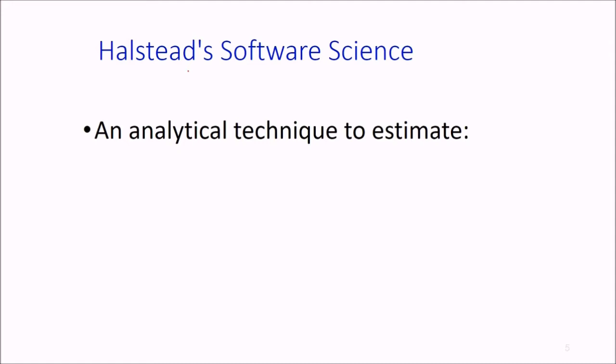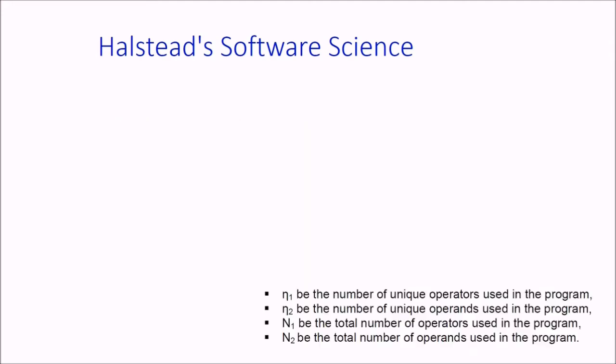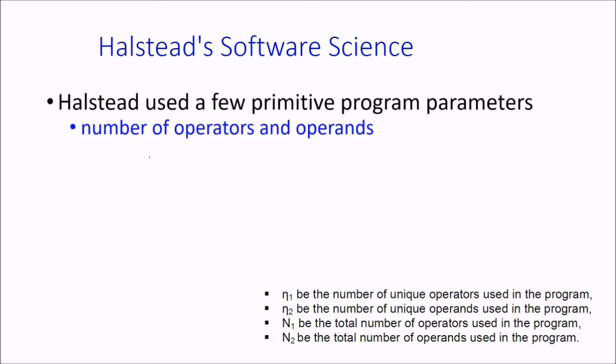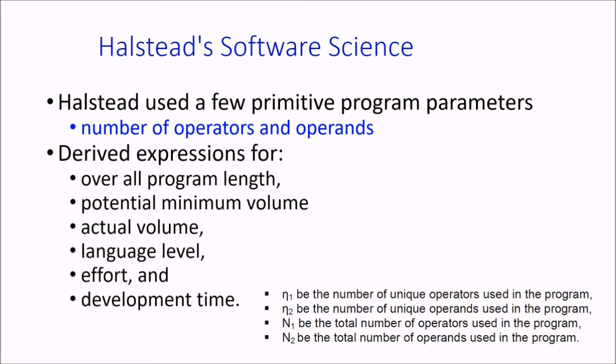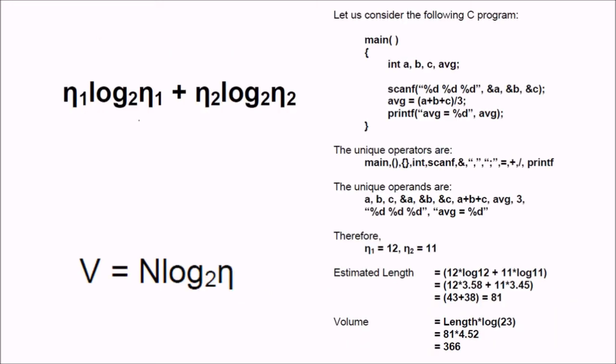Then Halstead, it is an analytical technique he proposed to estimate the size, effort, and time. These are similar to what we've seen in COCOMO, where from size they computed effort and time. So these are the values he has proposed. His primitive program parameters are: number of operators and operands. We can have derived expressions for overall program length, the potential minimum volume, actual volume, the language level, the effort, and finally the development time.